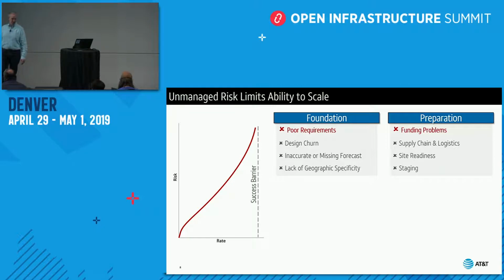Supply chain and logistics is another big critical thing. Does your supply chain know all this demand you're about to put on them is coming, and are they going to be able to fulfill it? And then logistically, can all those materials be delivered? We had a situation where we were working over Thanksgiving and Christmas, launching the 3G network for the iPhone, working with a contract manufacturer.